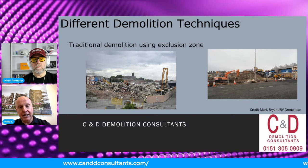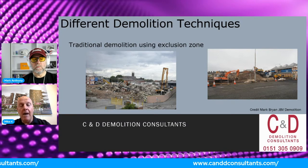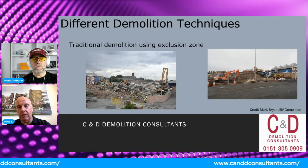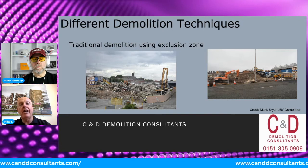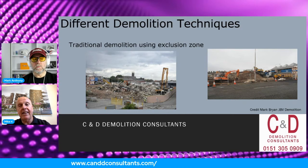So I think we as an industry, we as consultants, the National Federation of Demolition Contractors, the Institute of Demolition Engineers, anyone working alongside the car park or a client needs to say that the best way to do it is to close the surrounding roads off and get the car park down safely. Because if we do it where there are people coming past, and we put scaffolding and hoarding around there, there is a chance of a catastrophic failure. So my advice was to close it off, seal it down, and produce an exclusion zone.